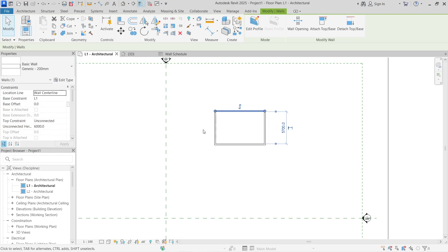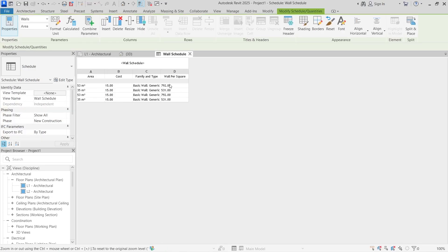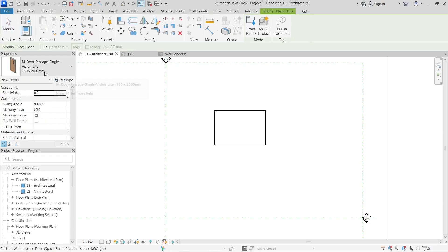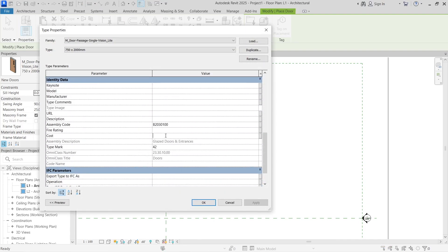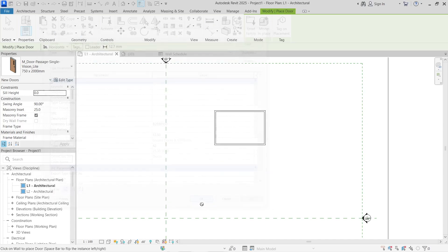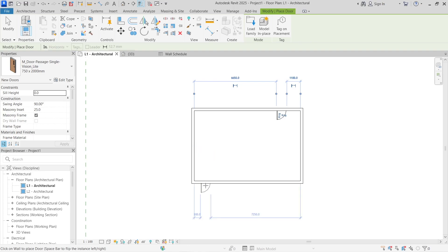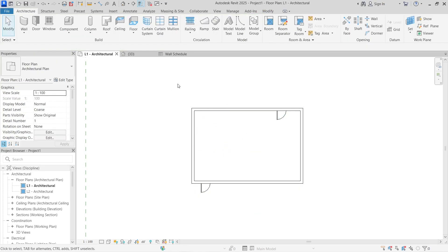Go back to the wall schedule and you can see that a cost value has been assigned to each wall, giving you a cost estimate for the rectangle we created. The same process applies for doors, windows, or any element. I'll add a simple door — go to Edit Type, scroll down to the material cost, and set the door cost to $12.50 per unit. Click Apply, then place one door at each end of the building.